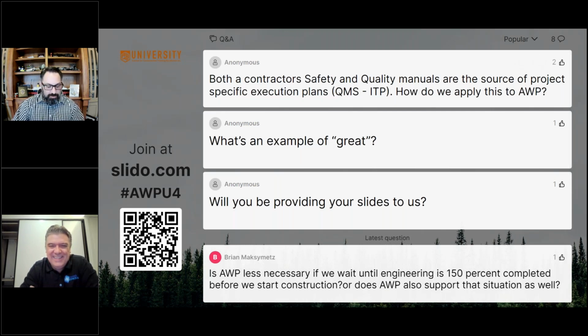Right, and I think that is a very good point. I think that a lot of people get caught up in that because they don't understand how to tie the CWP to those activity IDs. And they think that there needs to be an entire restructuring to the WBS, which sends project controls on their ass, pardon my language. But what ends up happening then is everybody gets in an uproar because we've now changed the entire internal structure to an organization and violated the simple philosophy that AWP is an overlay, not a replacement for our existing procedures. So thank you, Ted.